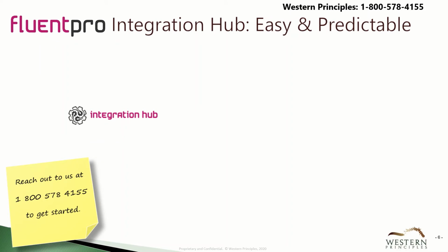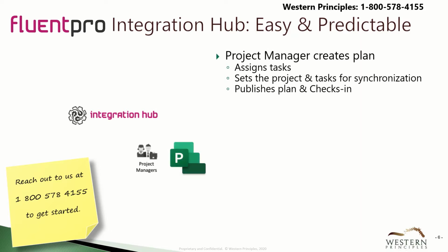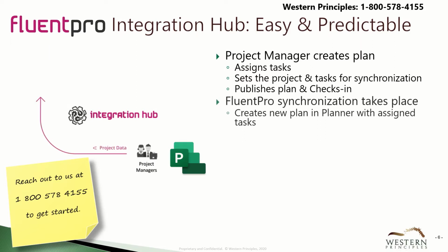The FluentPro Integration Hub is the easy and quick way to integrate tasks between Microsoft Project and Planner. What does it do? The project manager creates the plan with some simple configuration to integrate with Planner and assign tasks. The Integration Hub creates the plan in Planner and assigns the work.